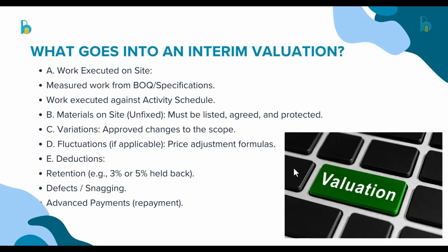So sometimes we have material on site and we have material off site. Offsite, so there are two different things. When you have material off site, you need to have a written agreement whereby that store, or wherever you store those materials, is yours.